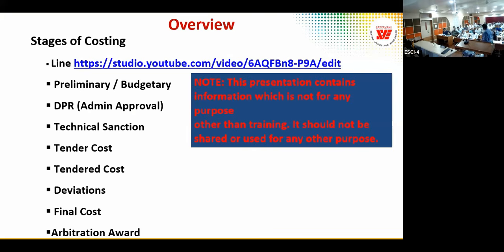And we put a condition of variation or deviation within each section, not in the overall project cost. Otherwise, technical sanction has no sanctity. Then it should be component wise. Yeah, component wise. Normally, for penalizing the consultant or looking at the variation, we give it per section.